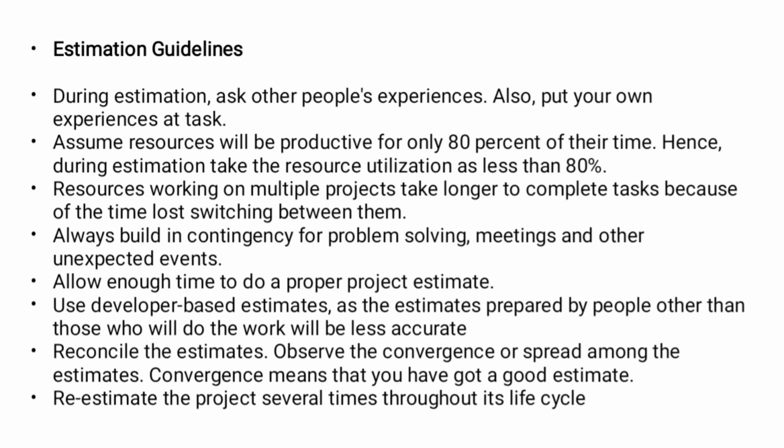Estimation guidelines. During estimation, ask for other people's experience. Also, put your own experience at risk. Assume resources will be productive for only 80% of their time. Resources working on multiple projects take longer to complete tasks because of the time lost switching between them.